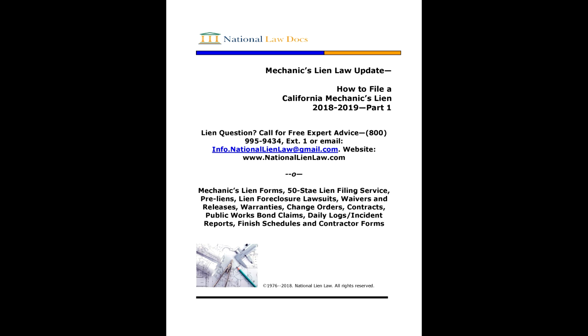The lien amount can only be for the raw principal owed. When you go to court with a lien foreclosure lawsuit, you also get finance charges and/or prejudgment interest, as well as court costs and attorney's fees. So your lien itself should just have the principal amount and have the phrase, in addition, prejudgment interest and court costs and attorney's fees according to proof at trial.